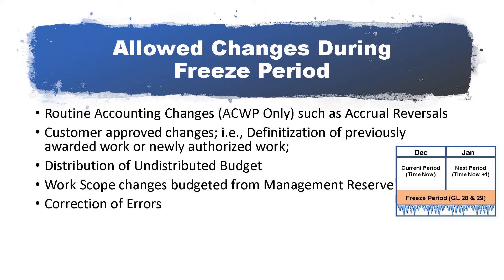Errors that are discovered in earned value data need to be corrected promptly. If the error is in previously reported or current period data, these adjustments are reflected in the current periods of Formats 1 and 2, and explained in Format 5. There can be a broad range of reasons that qualify as errors; however, poor planning or significant variances do not qualify.